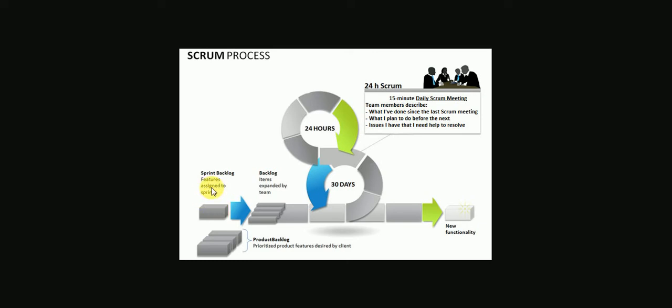and inside the sprint there will be a few features which will be assigned to the sprint, and there will be a separate sprint backlog which will contain the list of product features which are taken out of a product backlog and then parked into a sprint backlog. The backlog gets defined. It's the responsibility of the product owner as well as the scrum master, according to the agile methodology, to decide the sprint backlog and to explain the sprint backlog to the agile scrum team.